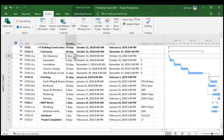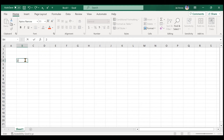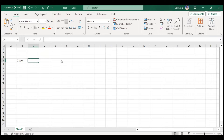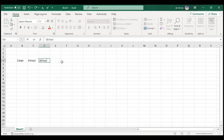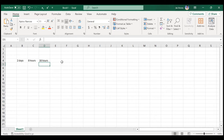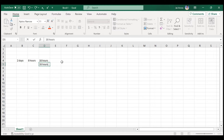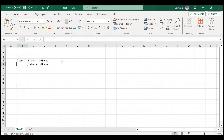If you assign the IT Building Calendar to this activity or the whole project, that calendar is based on 10 hours of work every day. MS Project will change the duration. Right now the activity duration is two days and eight hours of work per day, so 16 hours total. MS Project keeps the total work constant at 16 hours, so at 10 hours per day, it will change the duration to 1.6 days.